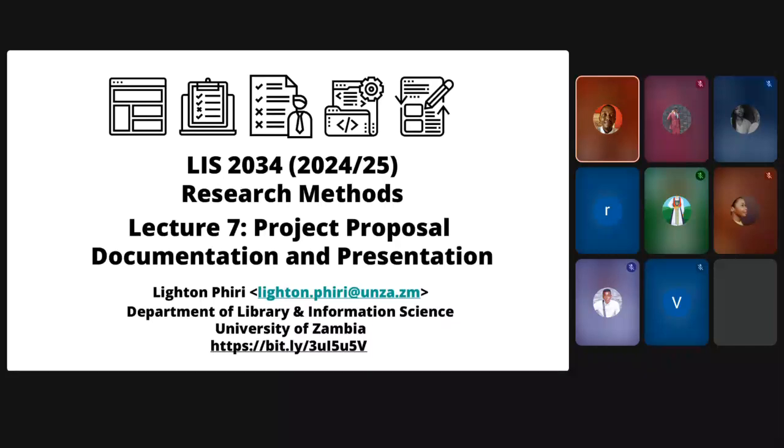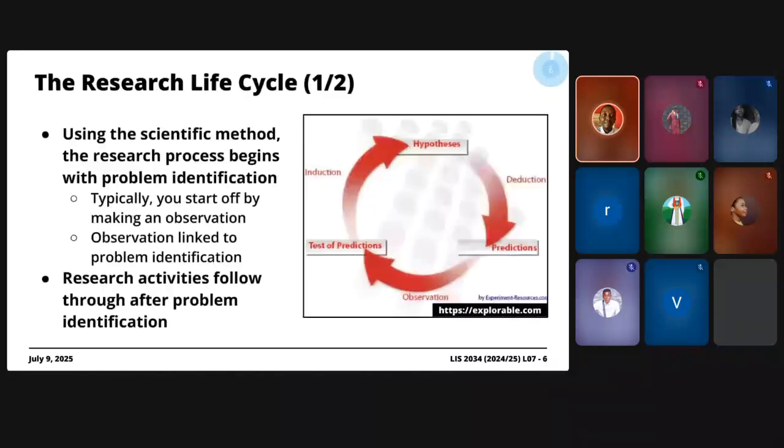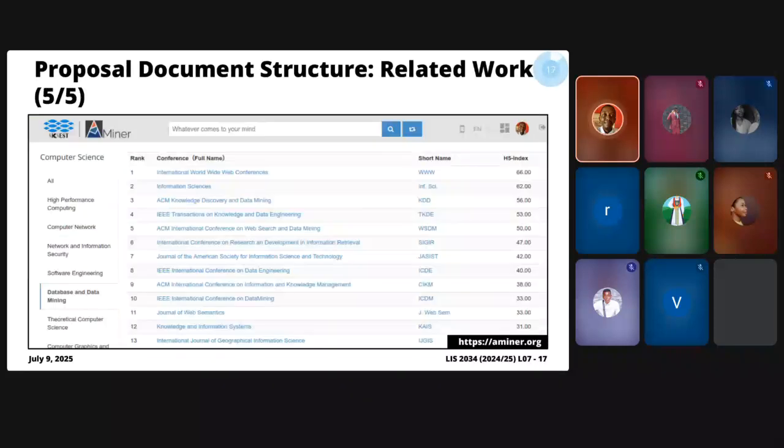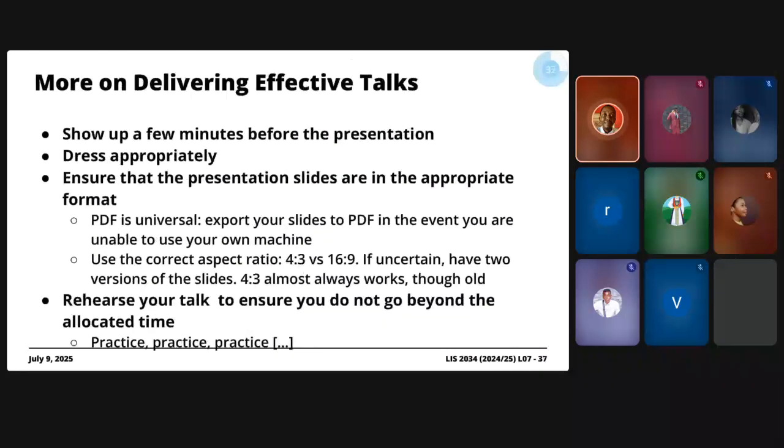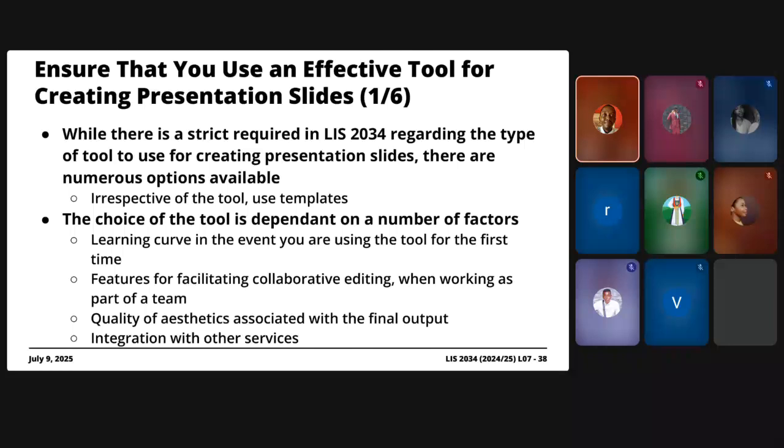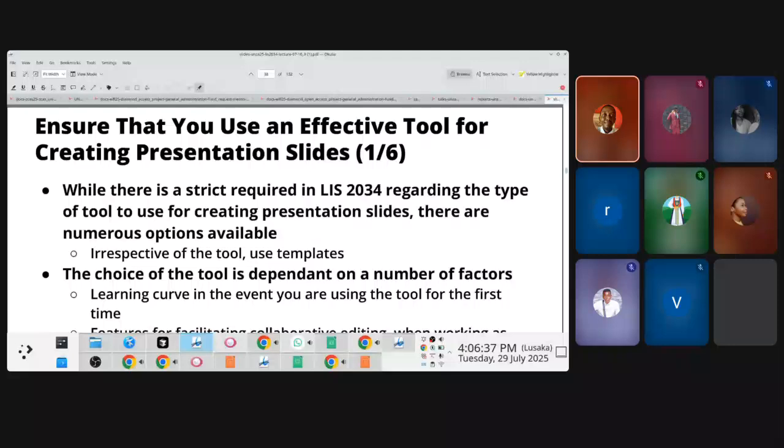Thank you very much. Right, and so what we've done so far is we've looked at two main project management artifacts, things that we'll typically find in a typical proposal. So we discussed a Gantt chart, and we realized that for us to come up with a Gantt chart, one of the things that we ought to do is first prepare what we introduced as a work breakdown structure. So this hierarchical structure that ideally showcases how the project has been decomposed, in essence, right? How the project has been decomposed.